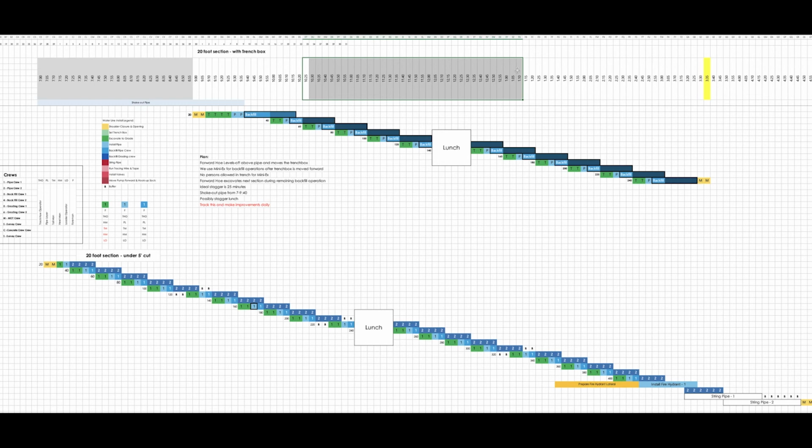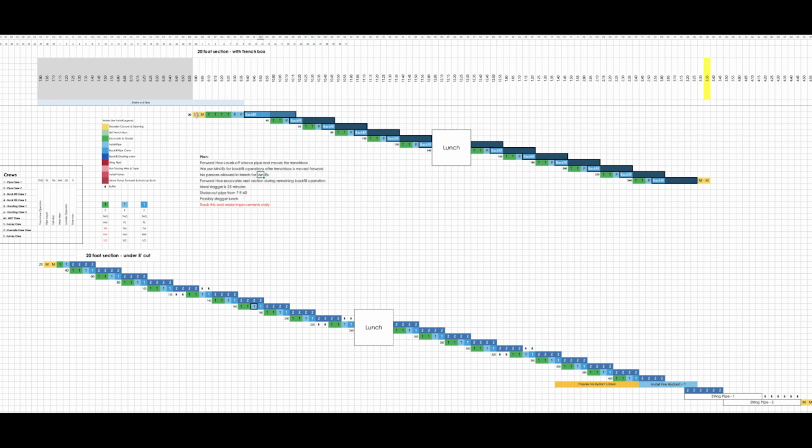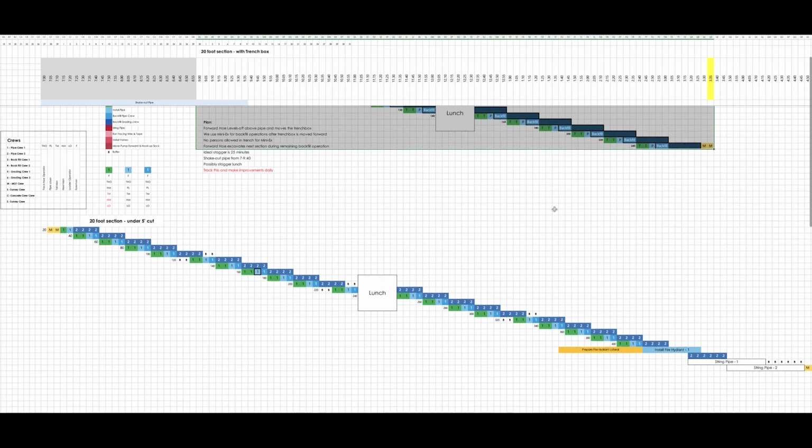So you're following all the production laws. We minimized the batch sizes. We were able to make sure that this was sequenced in a flow with workflow, trade flow, and logistical flow, and we're able to optimize bottlenecks, optimize the actual sequences themselves according to Kingman's formula, and reduce variation by being able to see where we're supposed to be. So this is a plan that the superintendent, foreman, and workers can all take and use as their baseline so that they can make improvements and reduce variation and fix what bugs them and see waste and see unevenness and see overburden out in the field and really get better on a day-to-day basis.